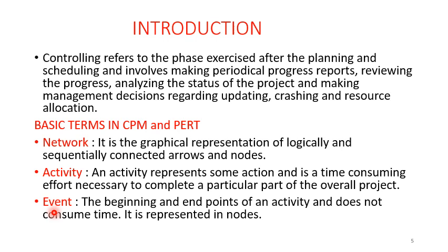For example, if I can give you another example, say a maintenance job on a heat exchanger in a refinery, the first activity could be dismantling of the pipe connections. Second activity could be dismantling of the heater. The third activity could be removing the tubes or the tube bundles. The fourth activity could be cleaning of the bolts, and so on. You can have different activities there, one by one, each one with a specific logical relationship with the other.